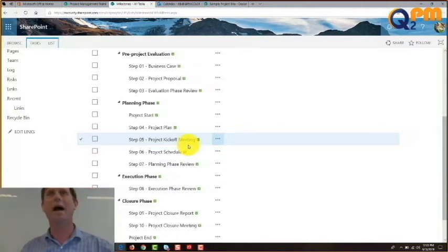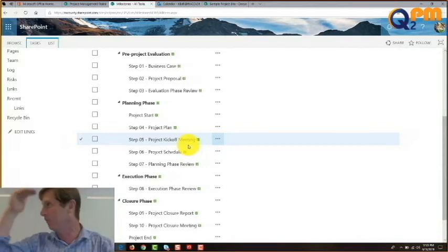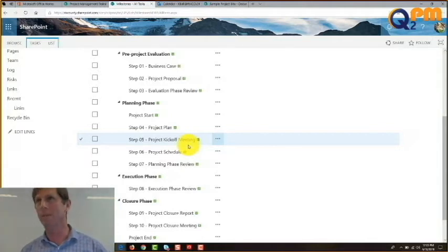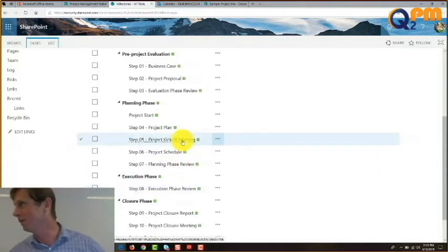So the schedule comes after we bring the team together. We have a rough idea of levels of effort, rough idea of the schedule, but the formal schedule follows after everybody that's involved has their say. We'll know roughly what we're doing, but they'll tune us.